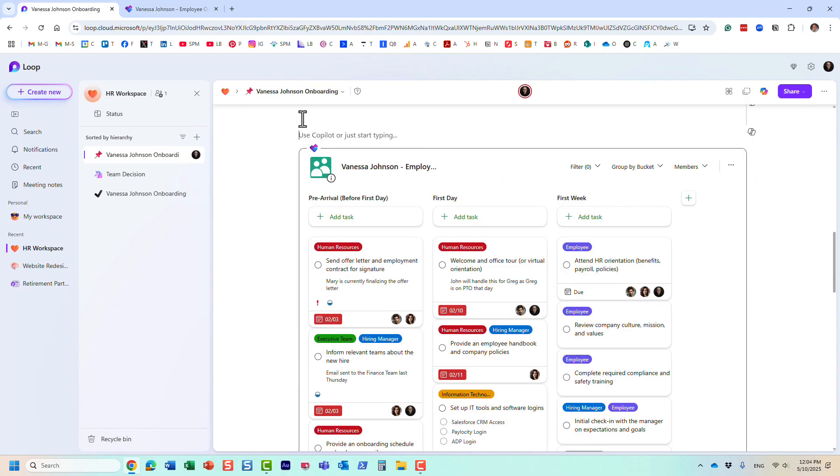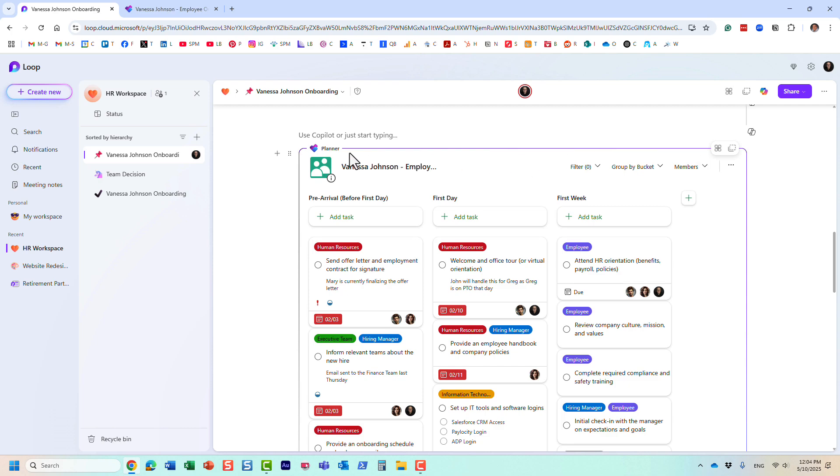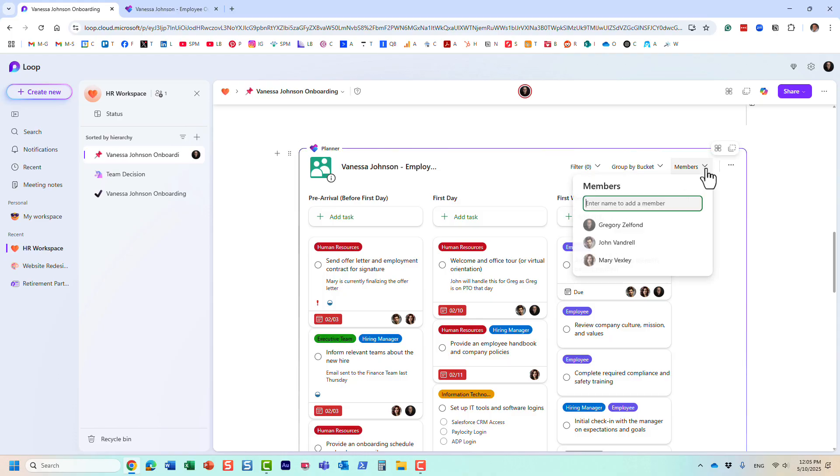It doesn't really matter what you have set in terms of sharing for this page. Maybe you invited 30 people, but the Planner security, this plan's security, is bound by that Microsoft 365 group membership. Very important.